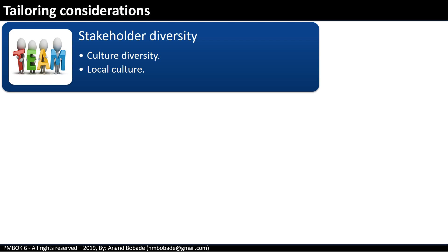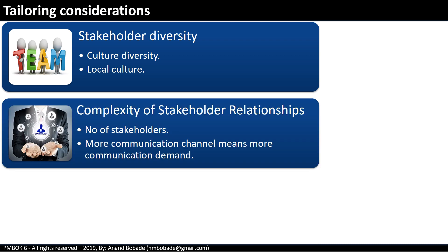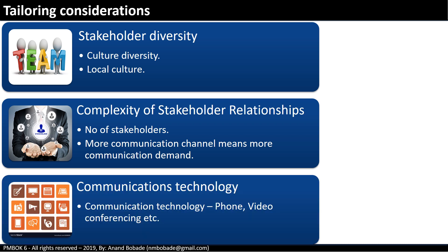Tailoring considerations: project conditions or the organization in which the project is executing may drive process tailoring. For example, a software project to change a small company's website may not need a lot of stakeholder engagement or management. Stakeholder diversity in the project team or local culture may demand special activities or means to engage stakeholders. A large number of stakeholders may increase the complexity of stakeholder relationships, demanding more communication channels. Use communication technology to eliminate miscommunication — for example, a phone, video conferencing, or a Kanban board for project status tracking can be very effective tools.